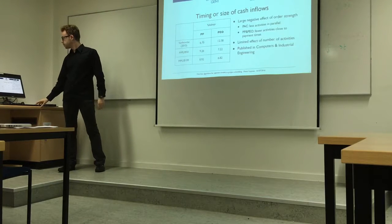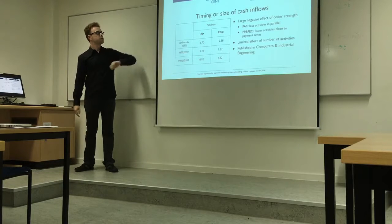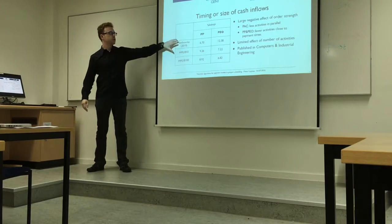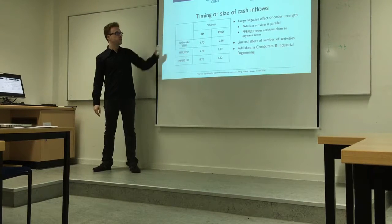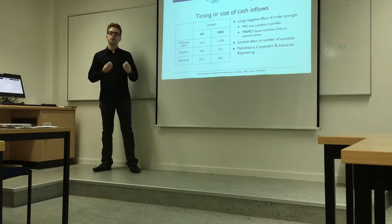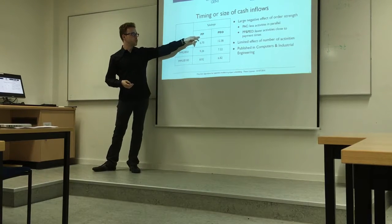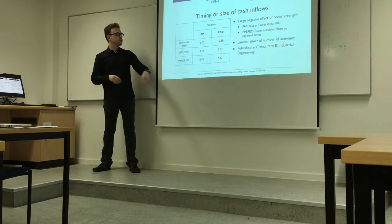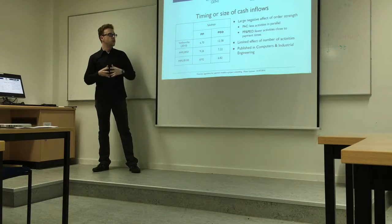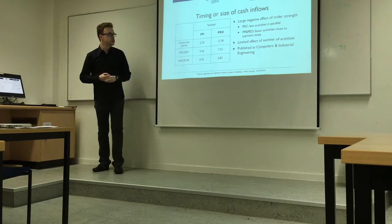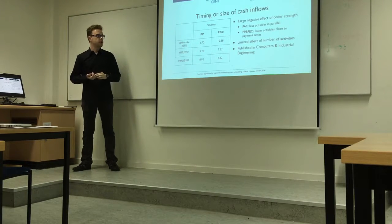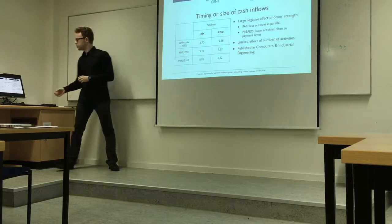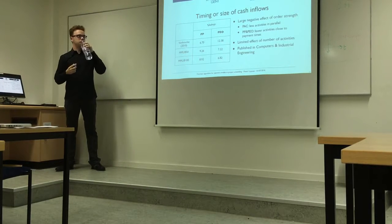For results, I tested on three datasets from literature. The table shows the percentage average improvement from applying the activity move rules compared to not applying them, for both progress payments with regular intervals and payment-at-event-occurrences with irregular intervals. An important finding from this chapter is that order strength has a profoundly negative effect on net present value.